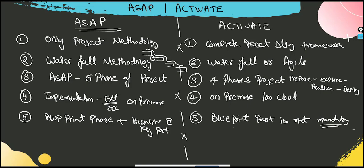Although, again, it doesn't mean that you go to a client and client says that we need to implement SAP S4HANA and we are using Activate, and then client says that I need a blueprint document, and you say that blueprint document cannot be created because we are implementing through SAP S4HANA. Again, Activate is just a framework which needs to be checked as a reference. If your client typically wants a blueprint document which was available in ECC implementation, the same way they want to have a blueprint document to be available, they want to do the blueprint thing, that can be done. You can include it as a deliverable in your project phase.